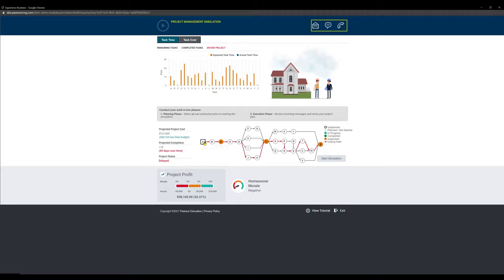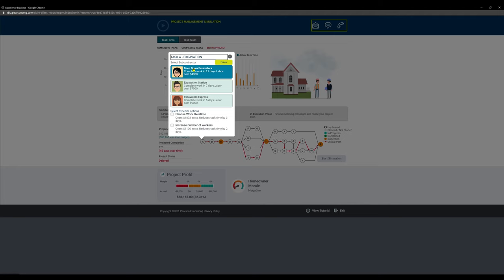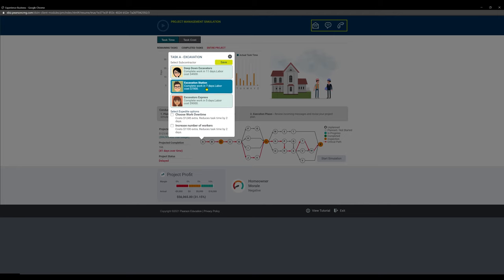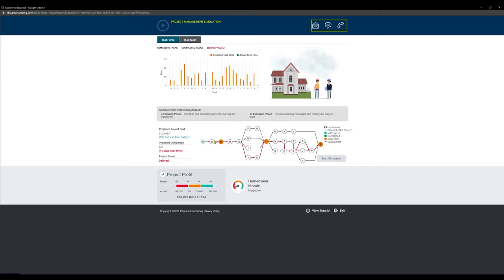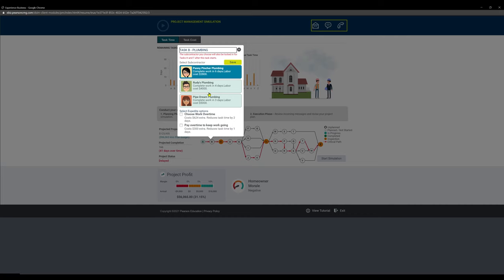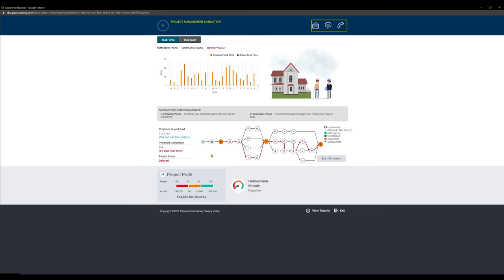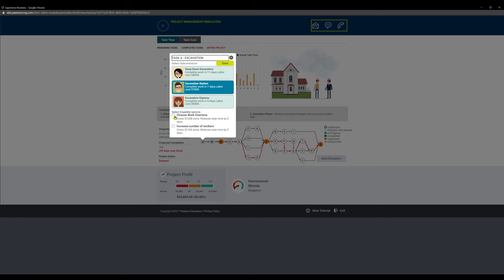Let's get started and start clicking on each task. We're going to pick the middle guy for almost all critical tasks, except for one. At the bottom here, you're going to see select these expedite options. If you pay $1,200, you can get two days back. Do not pick these yet. And I'll go through this as we do the game.